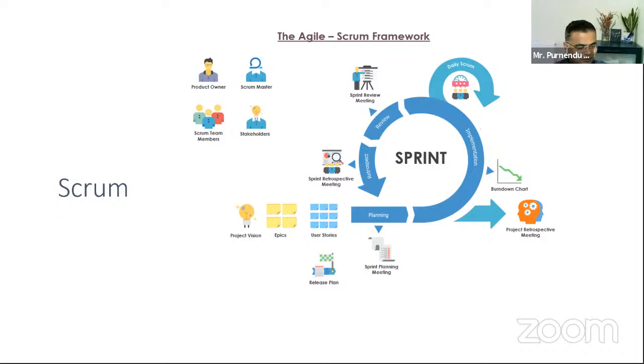In the review phase, we all sit together again and see whether what we have implemented is what they wanted. So we go back to our user story and check all these broken bits, right? And then we do a retrospective. Now, a retrospective is a session in which we all sit together and go through what we did, what went well, what did not, what was wrong, what was good, and we take that as a learning.